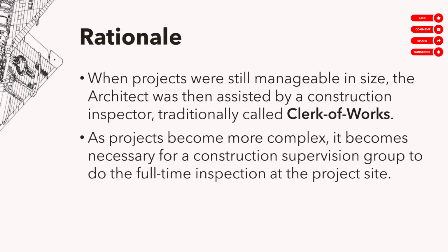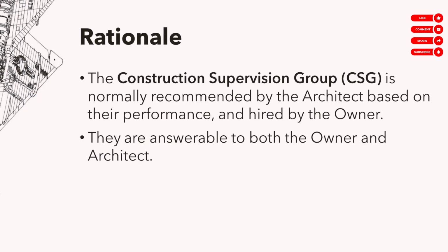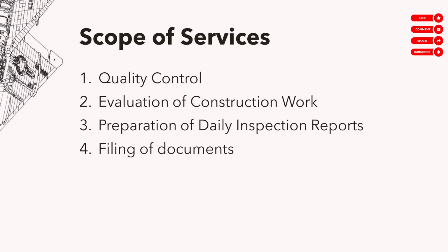But whether it's just one person or a group of persons, they're still doing the same job, which is full-time supervision of the construction. Okay. Now, if it's a group of people, we refer to the group as the CSG or the Construction Supervision Group. Normally, it would be the architect who will recommend to the owner kung sino dapat yung CSG, if it should be a group or just one person. And kung CSG siya or one person really, sino ba yung dapat i-hire? Basically, the architect makes a recommendation to the owner. Okay? And the CSG or the inspectors answer both to the owner and the architect of record.